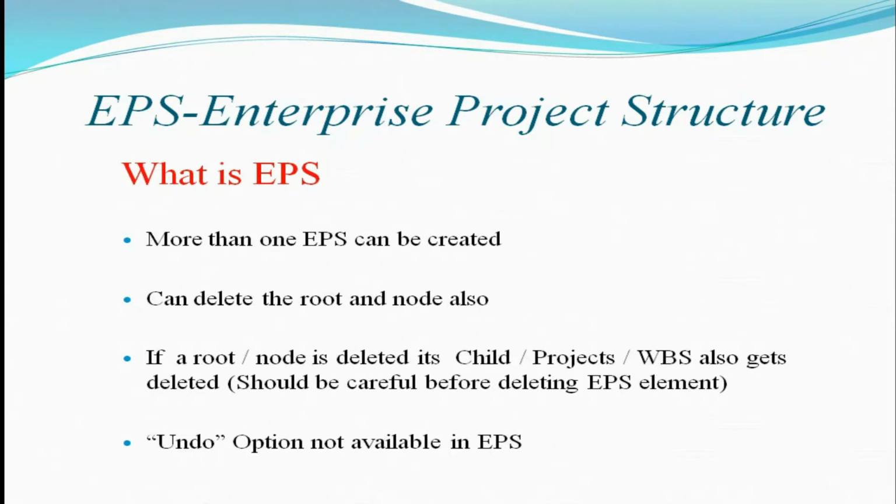Here we can delete the root and even the node also. So if we delete a root or node, its child or projects or even the WBS also gets deleted. So we should be very careful before deleting an EPS element. We can't undo. Means the undo option is not available in EPS also.